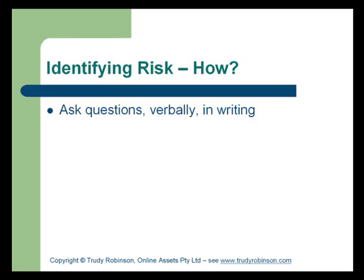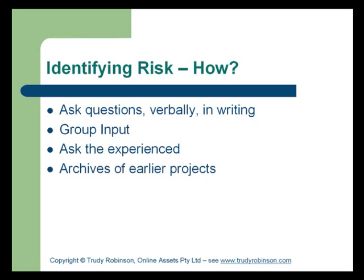You ask questions verbally, in meetings, in writing, in reports, in questionnaires. Group input is critical. Opinions, experience, variations, and interpretations of different individuals will all contribute to the identification and management of risk. Experience from those who have undertaken similar projects or have a background in the topic of the project is critical. Projects run within your organisation or within other organisations are an important source of archived information and lessons learnt. In the finalisation stage of any project, the identification of lessons learnt is really important, and that will contribute to the ongoing future risk management of similar projects.